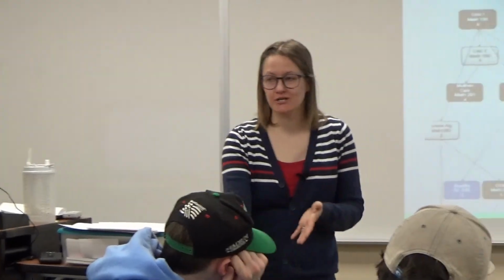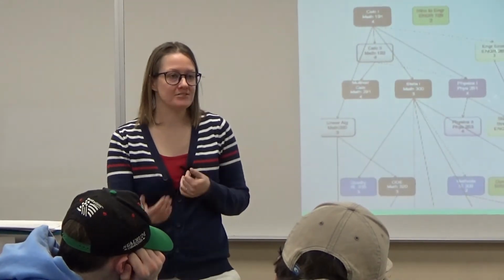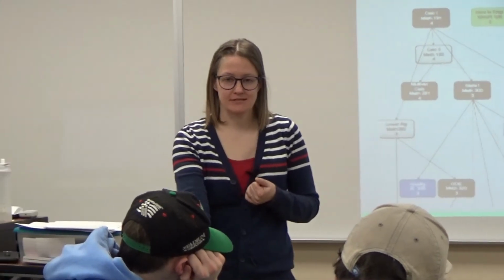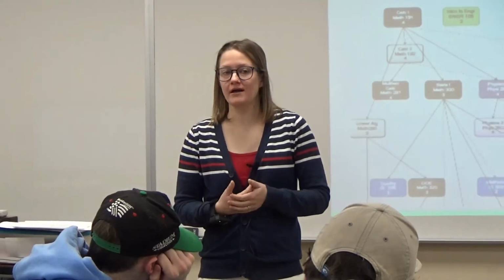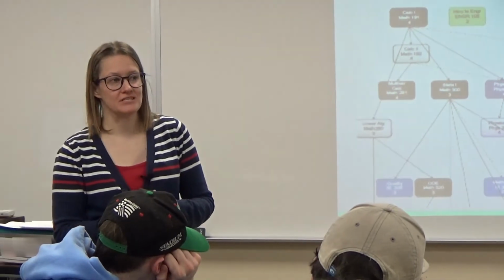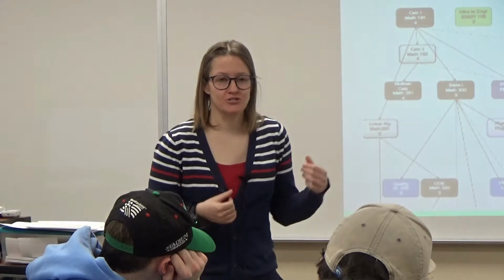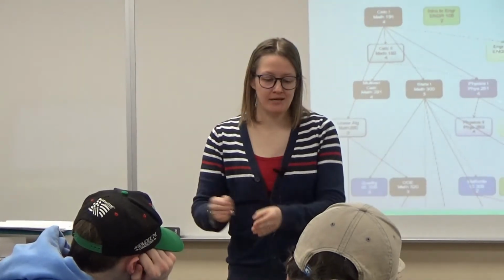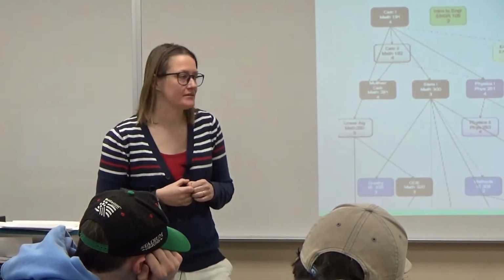So it's your critical path, meaning if you fall off schedule there, it has consequences for the end of your future project. So if you have a critical path, you want to think about, okay, what can we do to make sure that critical path doesn't ruin our chances for success? Maybe we should build in extra time, assume there's going to be a problem here and a problem here, and give us a few extra days to deal with it, something like that.